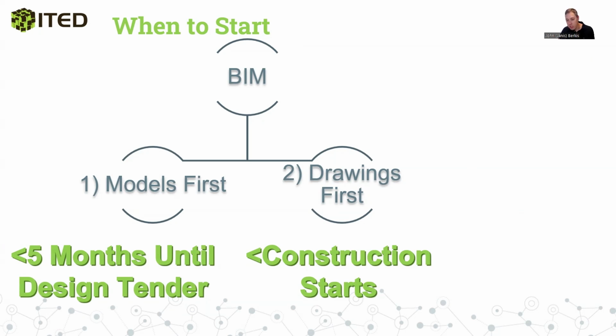So imagine the design is done, you model, you find out critical issues, and then you need to ask the designers to fix the design. What it usually means is that the design, or basically the construction, will be delayed. Maybe by a couple of weeks, but if the issues are critical, it will be maybe even months.